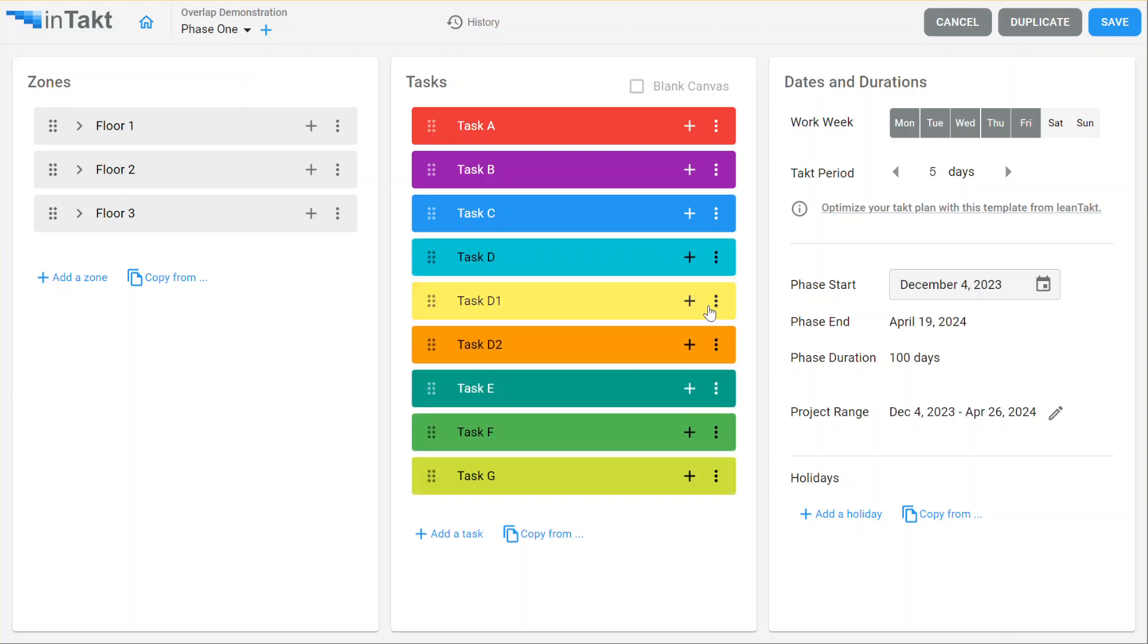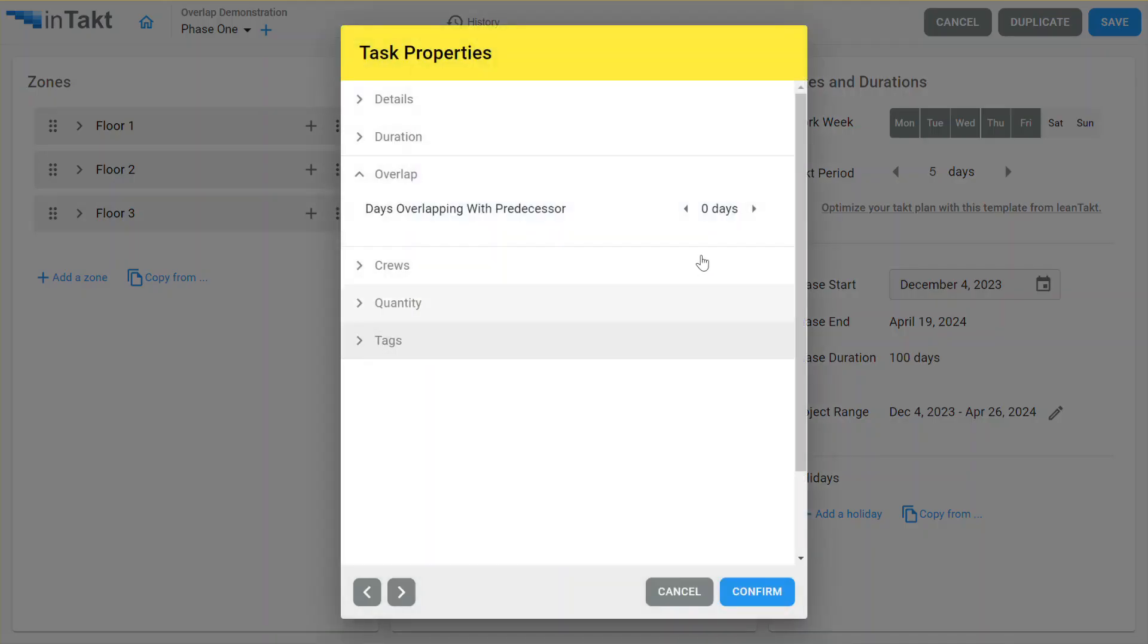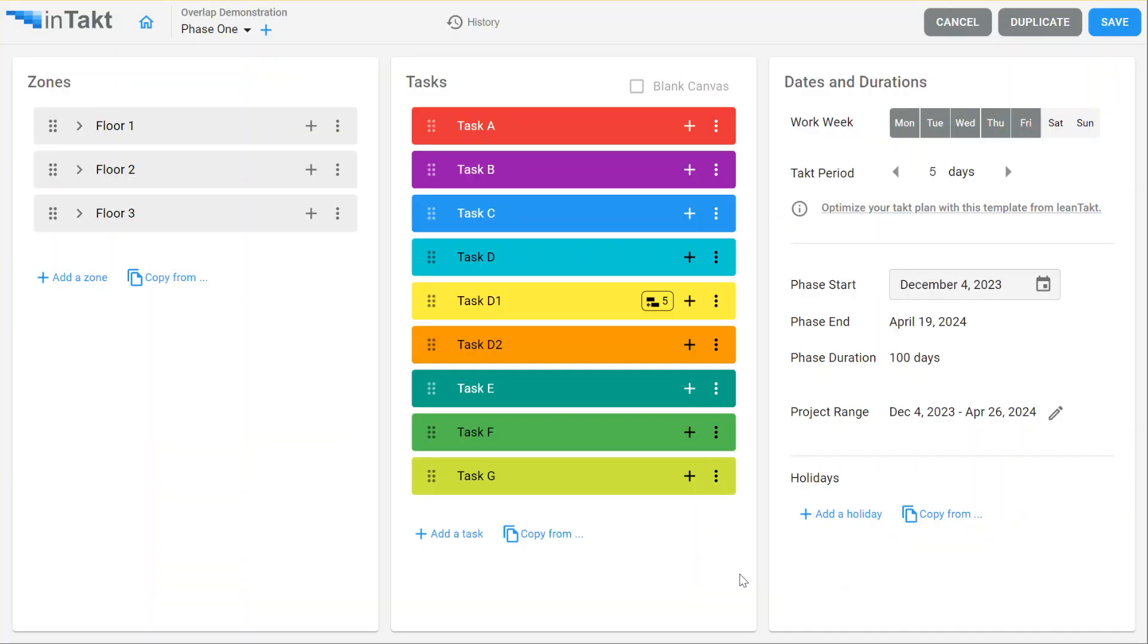I'm going to go into the settings on task D1, and I'm going to ask it to, under the overlap settings, overlap that by five days. So it's a full overlap.